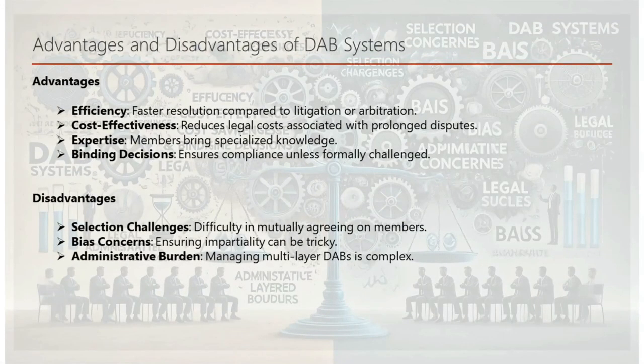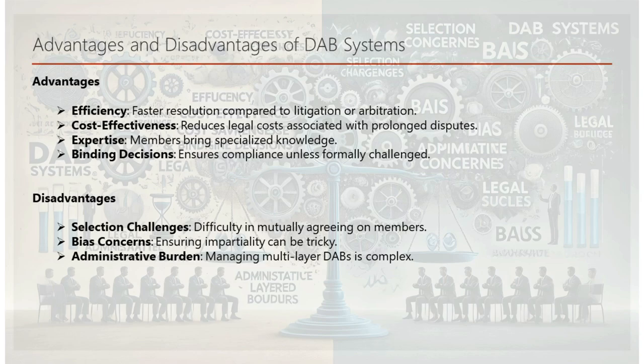Advantages of the DAB system include: efficiency — faster resolution compared to litigation or arbitration; cost-effectiveness — reduces legal costs associated with prolonged disputes; expertise — members bring specialized knowledge; and binding decisions that ensure compliance unless formally challenged. Disadvantages include: selection challenges in mutually agreeing on members, bias concerns as ensuring impartiality can be tricky, and administrative burden in managing multi-layered DABs. Understanding both benefits and drawbacks helps in making informed decisions about employing a DAB.